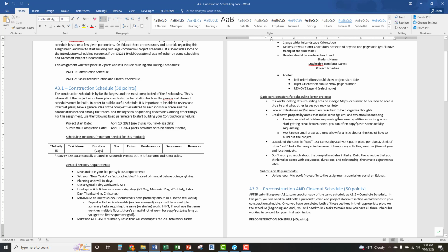So then we're talking different areas, different sequencing things. Our structure and our civil work is going to lead us into how we're actually going to finish out the building. So it's good to understand how that works first, getting a good idea from my site contractors, my foundation contractors, and my structural steel contractors about what makes the most sense for them, because that will help resequence everything, along with how we factor in lead times, and all that kind of stuff, to make the most efficient use of our schedule.